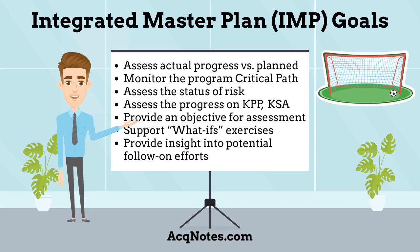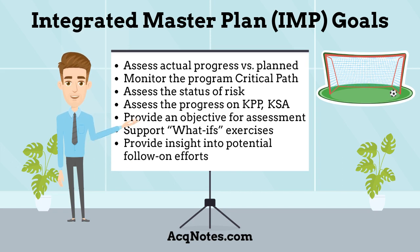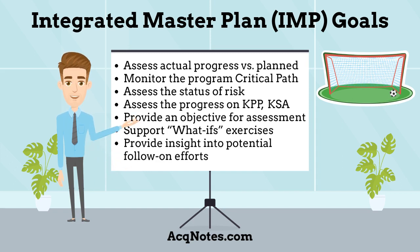What is the goal of the Integrated Master Plan? The IMP provides insight to the program manager, contractor, and program management office, which enables them to identify and assess actual progress versus planned progress, monitor the program critical path and help develop workarounds to problem areas, and assess the status of risk management activities based on the inclusion of program risk mitigation activities in the IMP and Integrated Master Schedule.